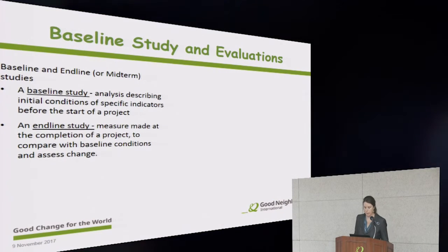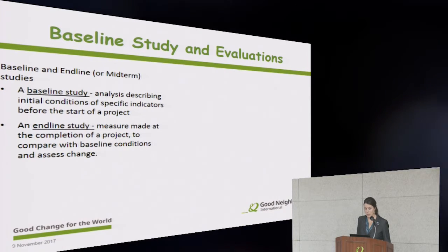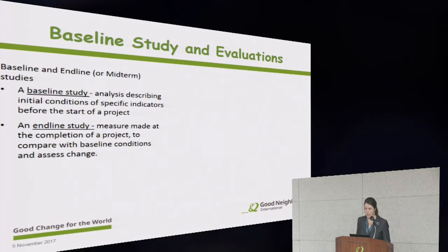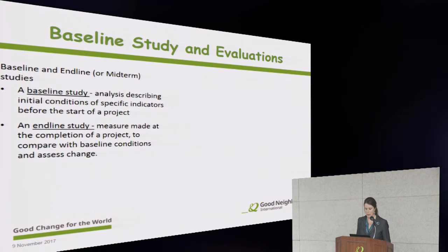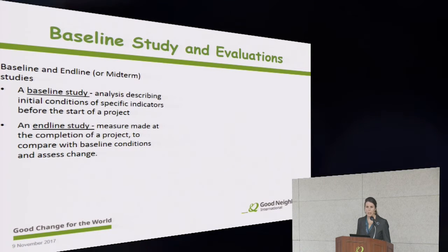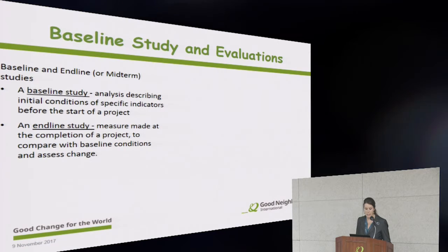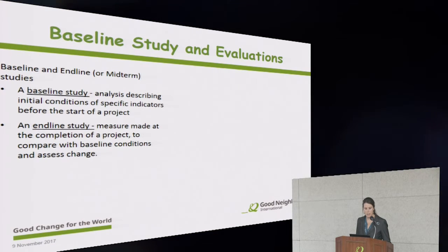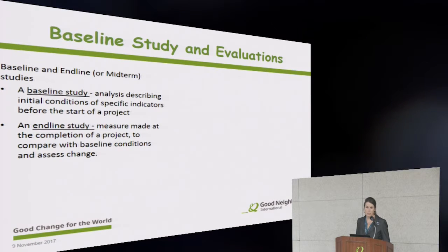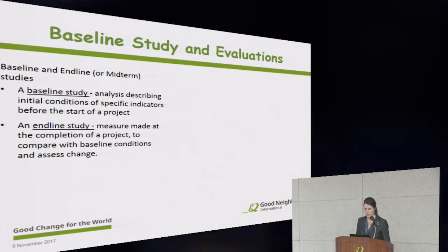So the baseline study and evaluation, as we already discussed, the main purpose of collecting baseline data is so that we can compare the status of indicators later on with the initial or baseline status of the same indicators. So more simply, so that we can see results. A baseline study then is the analysis describing initial conditions of specific indicators before the project, and then the endline study is a measure made at the end of the project to compare with baseline conditions and assess that change.